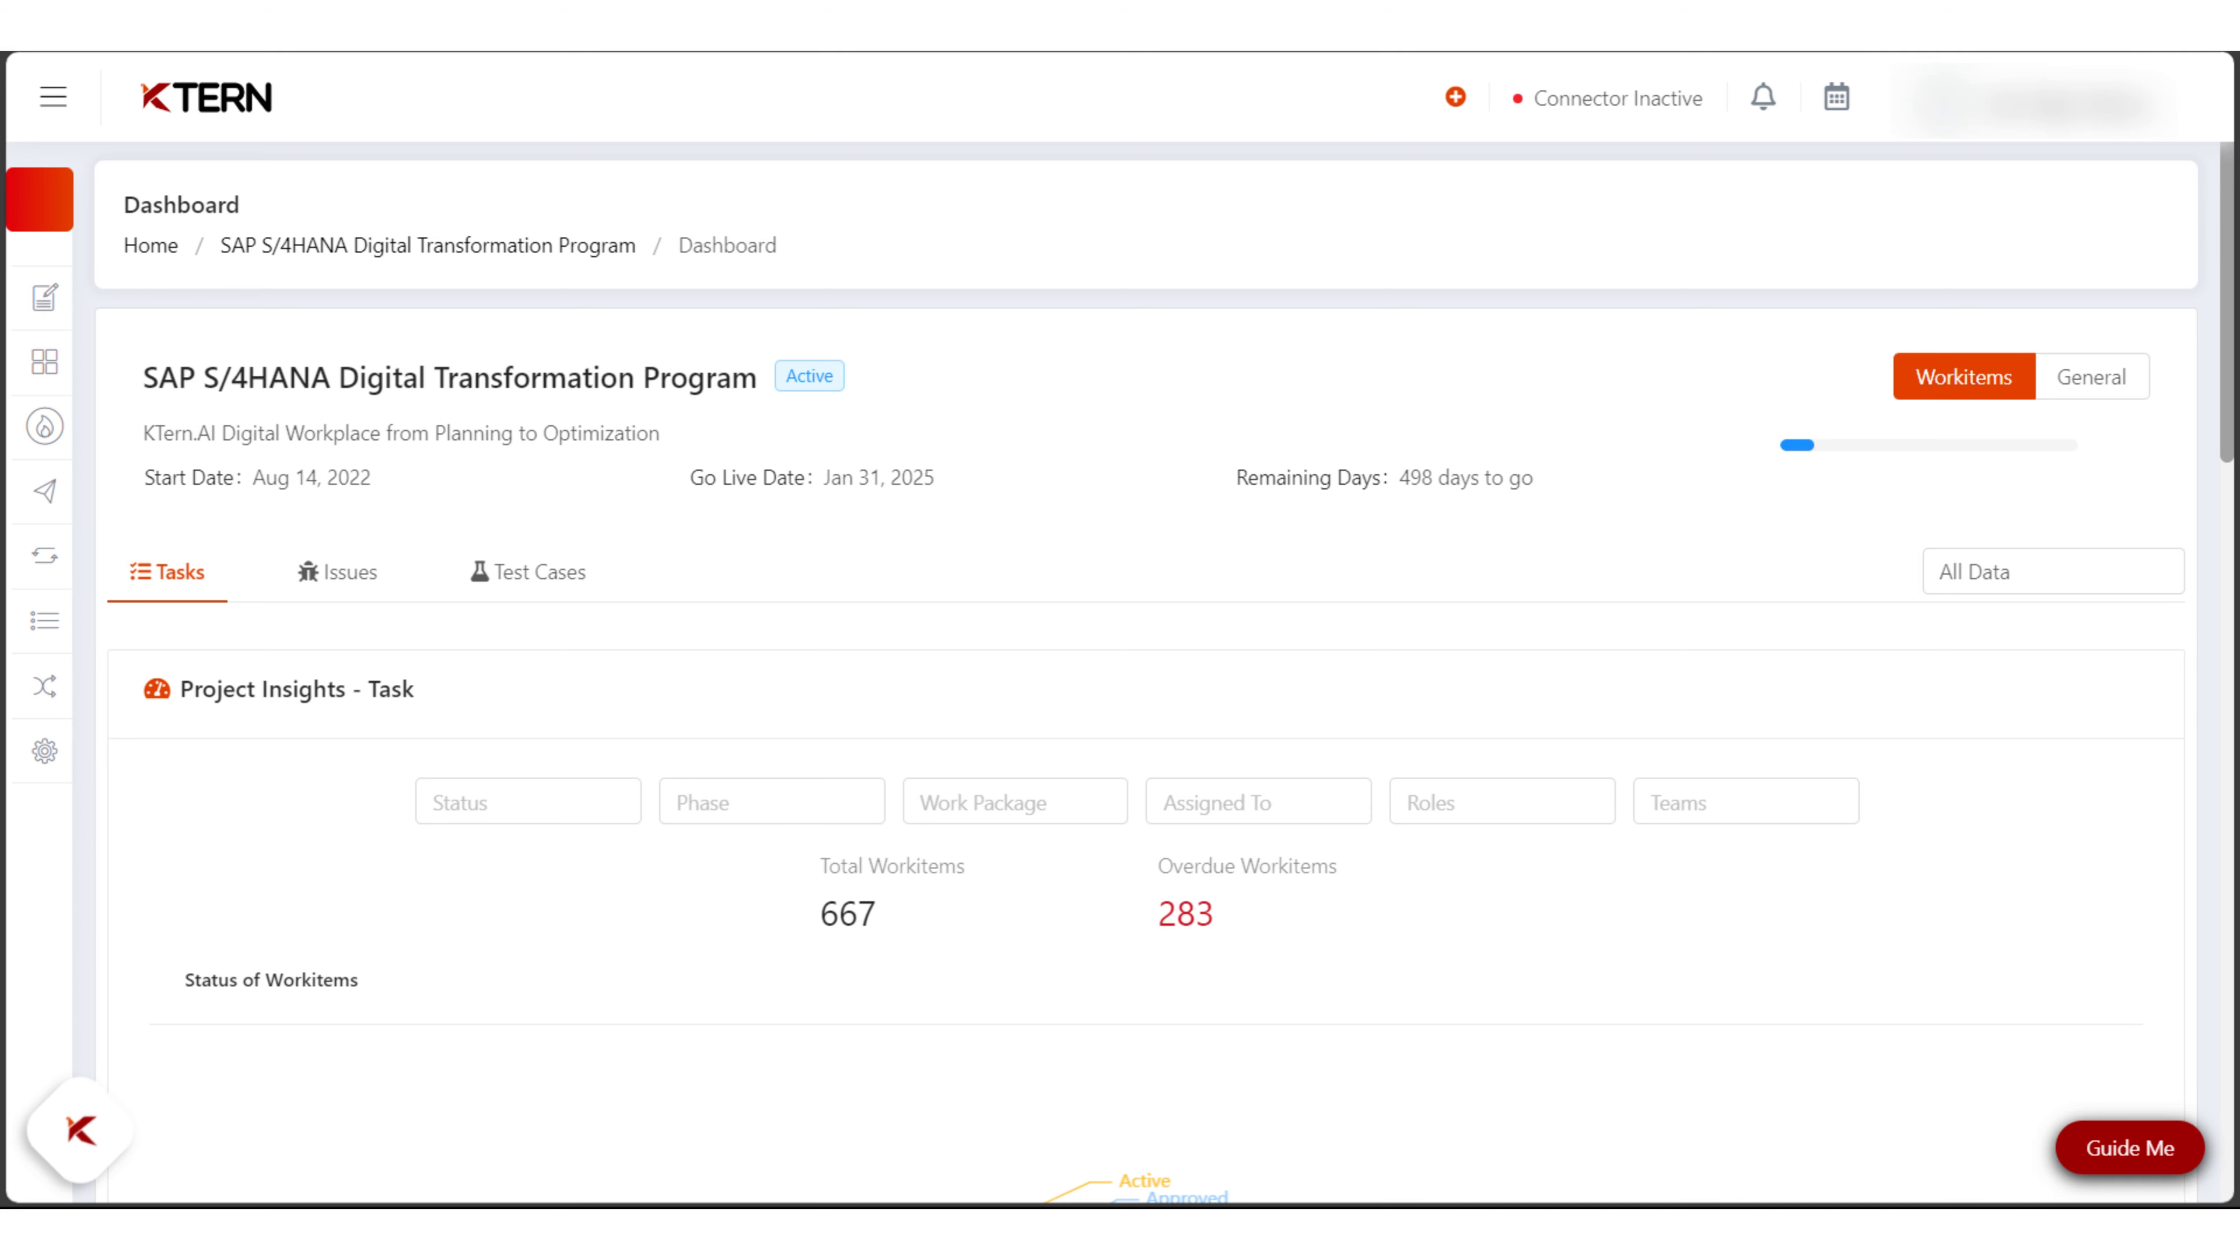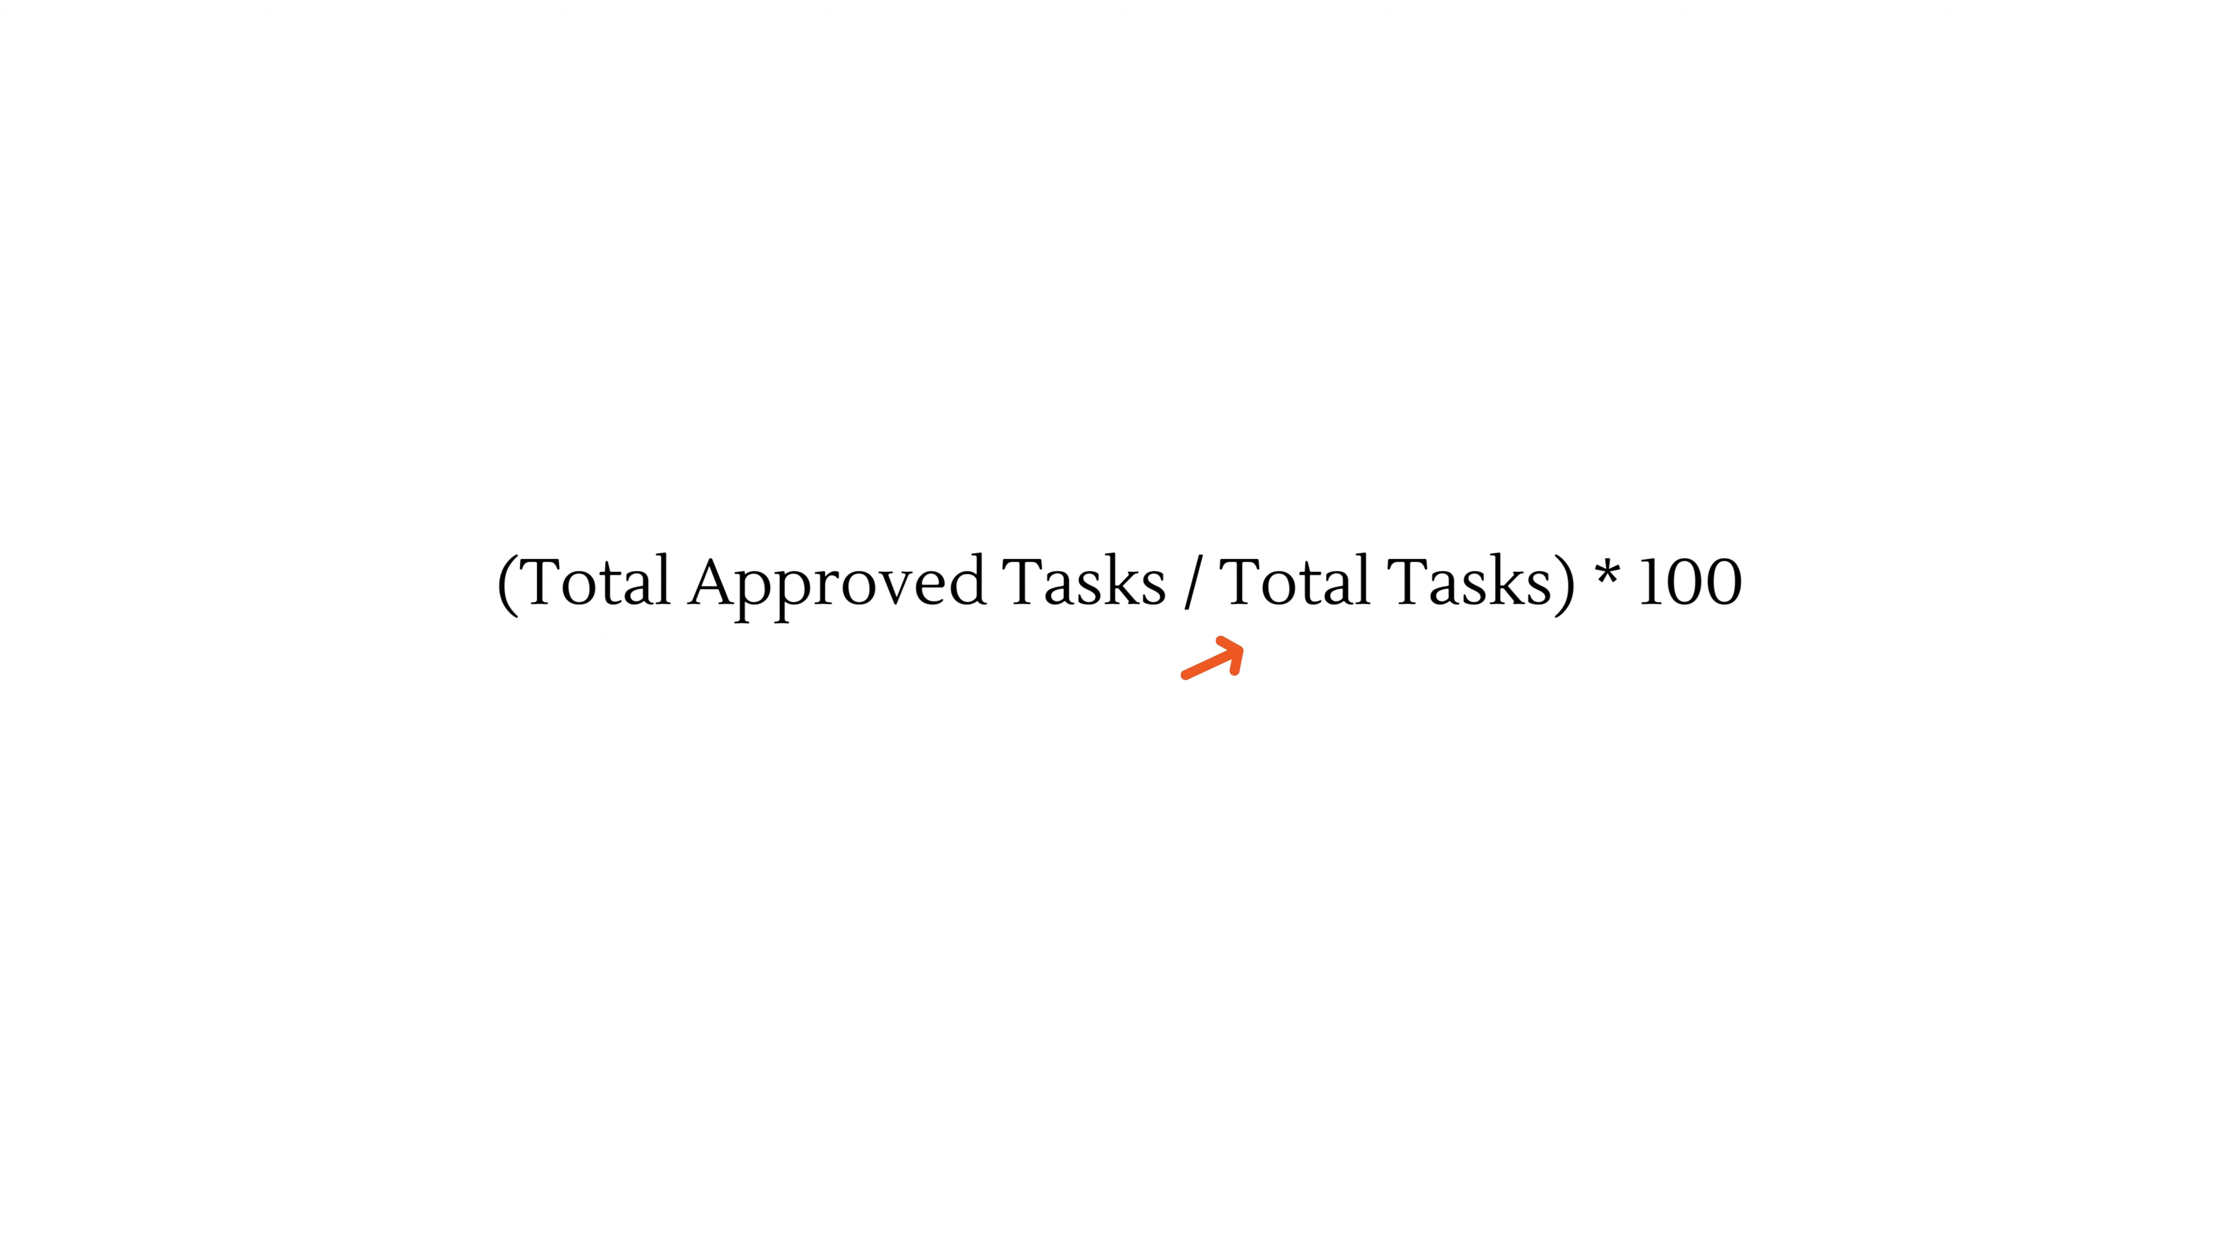Task completion: we calculate it by taking the total number of tasks and the total number of completed tasks. It's as simple as total approved tasks divided by total tasks multiplied by 100, giving you an accurate project progress percentage.